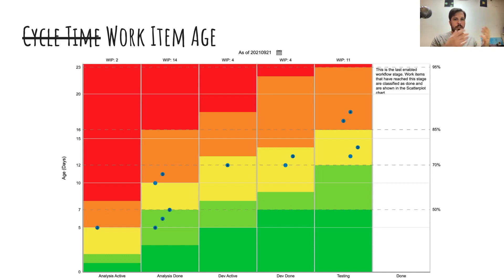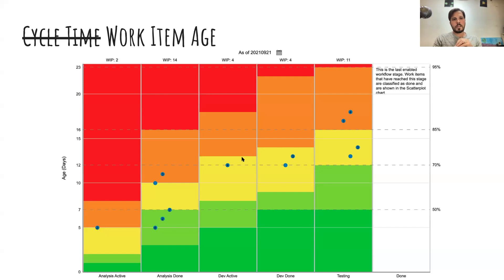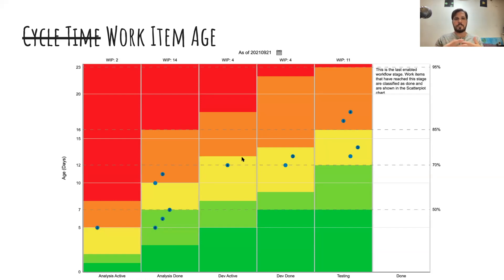You can use this chart during standup and when talking about blockers or improving organizational structure. You can say the old things are caused by a specific reason — they're all happening in the dev active stage because of X, Y, and Z. By preventing work items from aging, we can indirectly control cycle time. That's how we start having an impact on cycle time.